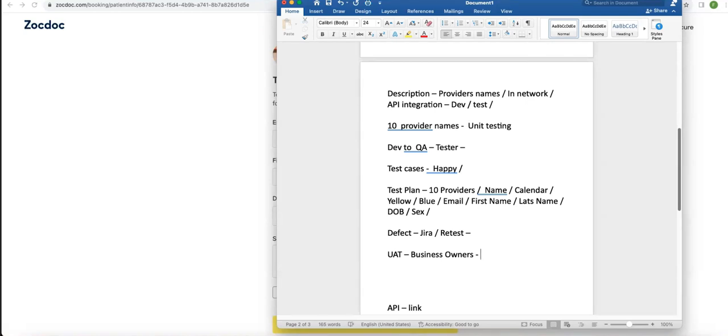So you can take one test case and show them how to test this particular scenario. If everything is fine, it needs to log in and book an appointment, and that scenario means it's a pass. So what is a fail or a pass? You're going to ask them to update that Excel sheet, and if all the scenarios are a pass, you can ask them to give a UAT sign off, right? All the scenarios need to be passed. Even if one fails, you ask them to retest, and once they provide sign off, only then is the code moved from UAT to production.